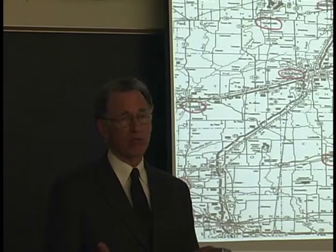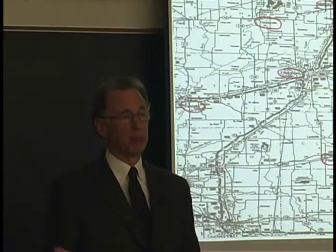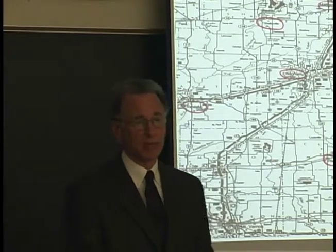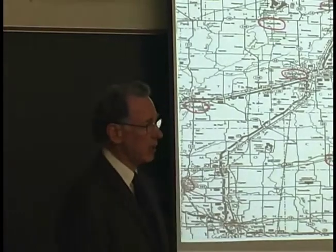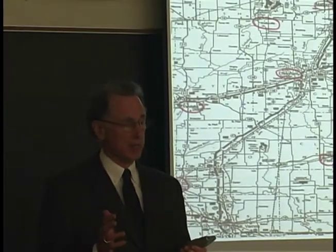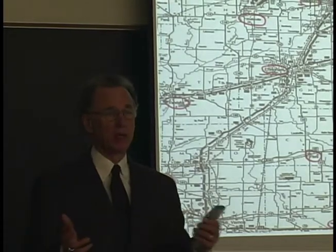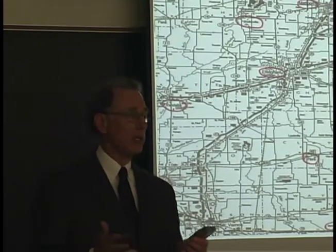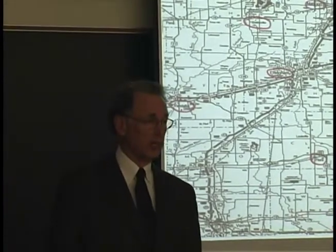In a state contract where it's been bid competitively against other people and the bids are read in public, you don't have that option. Whatever you've bid it for, that's what it'll take. And probably one of the biggest dangers is if you're bidding, let's just say, a concrete floor in a box culvert or in a building, and you're bidding that on a square yard basis, but you're going to buy the concrete from the guy on a cubic yard basis.